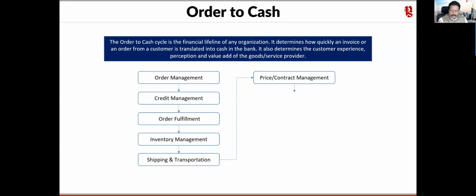And the converse of that is if the price is increased, let us say to 112 rupees, so the 10% limit is basically 110 rupees. Now, because there is an escalation over and above 10%, the supplier can supply this material at 112 rupees. Now, this 10% criteria applies supply to supply. I hope this is clearer for all of you.